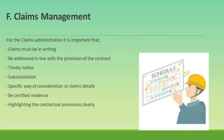Claims should be supported by certified evidence — having authenticated and verified evidence adds credibility and strengthens the claimant's position. Highlighting the contractual provisions clearly is also important; by referencing the exact clauses and terms of the contract that support the claim, you demonstrate how the claim aligns with the agreed contractual framework. These steps, when followed diligently, can help manage claims effectively, ensuring they are resolved in a structured and fair manner, thereby maintaining the project's progress and integrity.